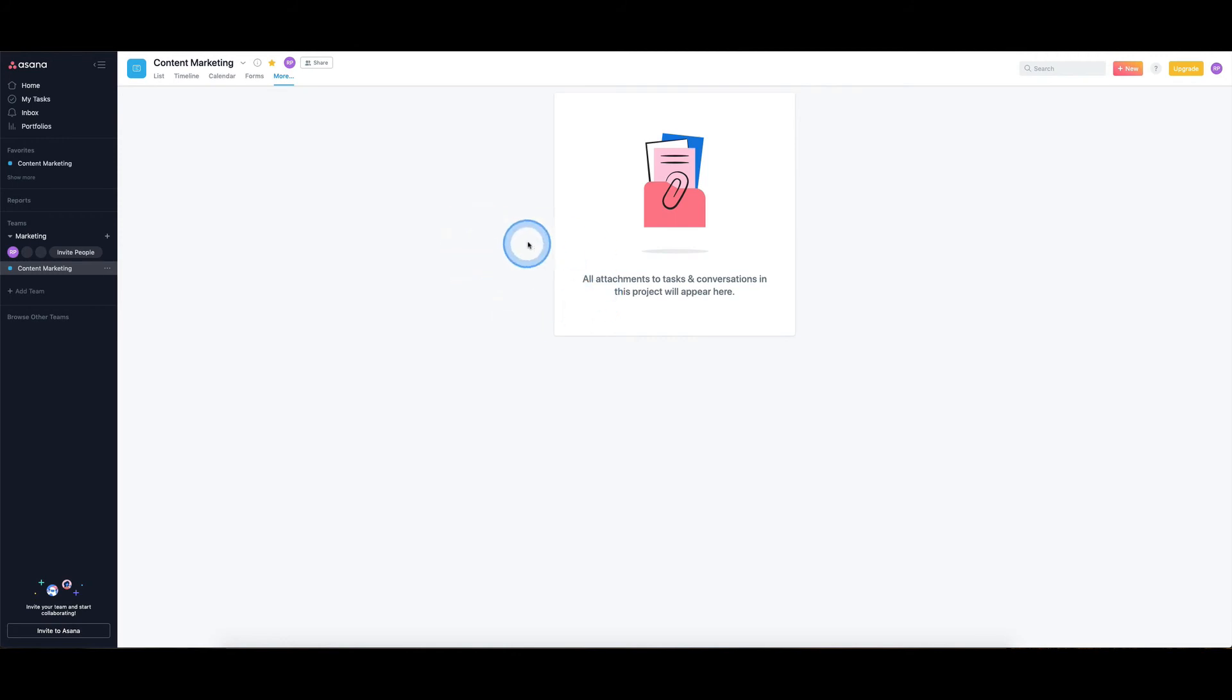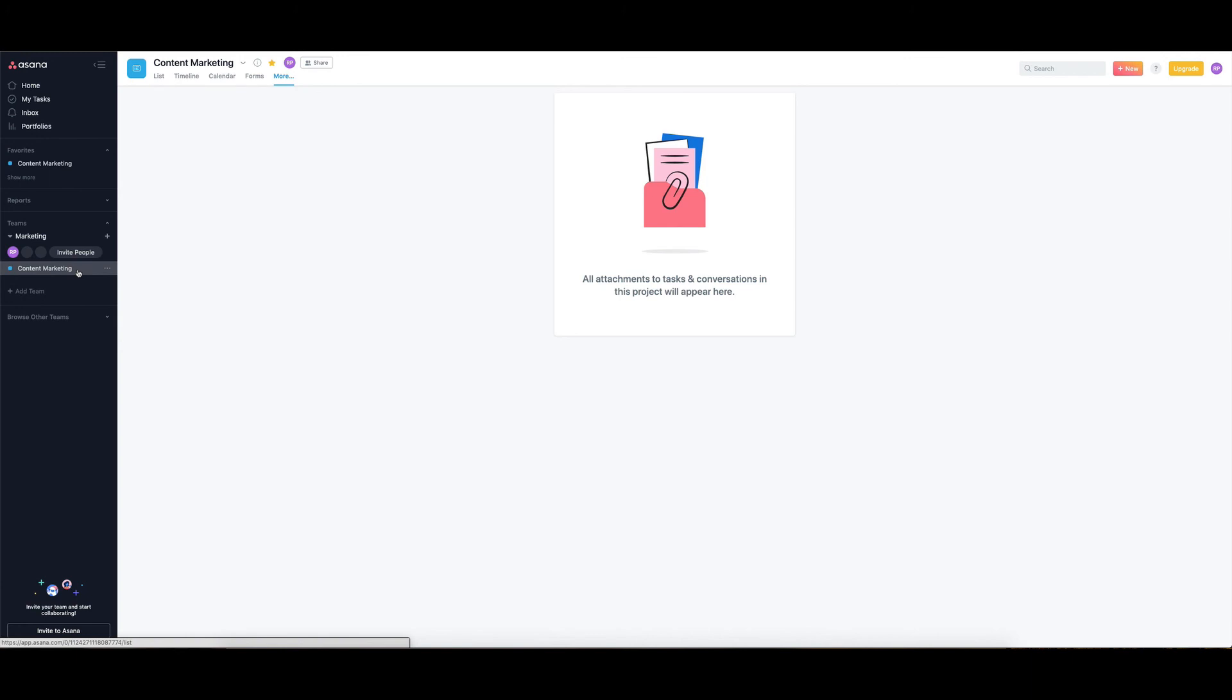Asana does a fantastic job of being able to use task templates. Now technically they're called project templates. So say for content marketing, I want to start a content marketing project where it has 20 items on the list, I would create that from a template. I would start that project, I would run through all those action items, close out that project, and then start a new project with a new template to get started. Some people don't really like that in terms of the reusable kind of checklist functionality, but it does work for a lot of teams. So using that templating is going to be really handy. I hope you have found this useful for this whirlwind tour of Asana. If you've got any questions, let me know.